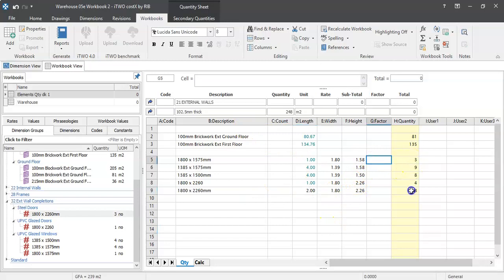So, as you can see there, I might highlight them. Doesn't really matter, bring them out at 2 decimal places just to see. As you can see there, they're adding my doors to my total area, which isn't the case, so I need to put in -1 in my factor. I'll just change them to a negative. So handy little way of getting a negative deduct in your quant, or you could just select one of these, maybe -2 doors, -1 doors. So put a minus somewhere in the calculation and you'll change all those to a deduct. So you can correspond or compare that.